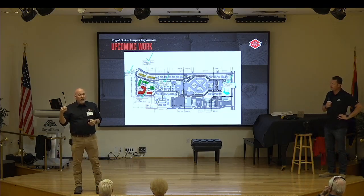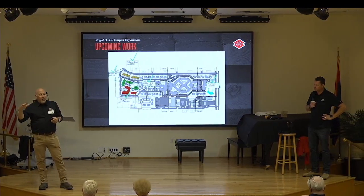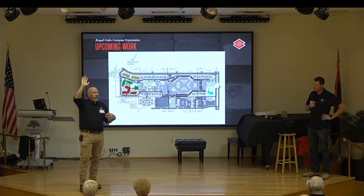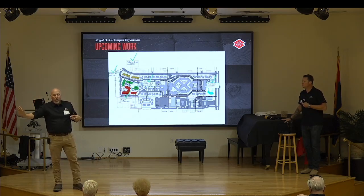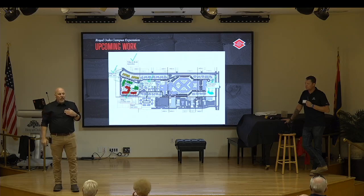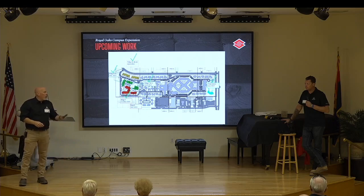So warranty is different. We provide a 1-year warranty on the building, but we don't mix that with the punch list. That goes into a system called WorkSub. So it goes to Paula and Darren and Royal Oaks first. They decide whether it's something that the contractor should fix or whether it's something Royal Oaks is going to do something about. And then we get it through that system. So it could be that it's a warranty item as well. Lisa handles both. And she's super responsive typically, unless we clutter her job with other things, right?